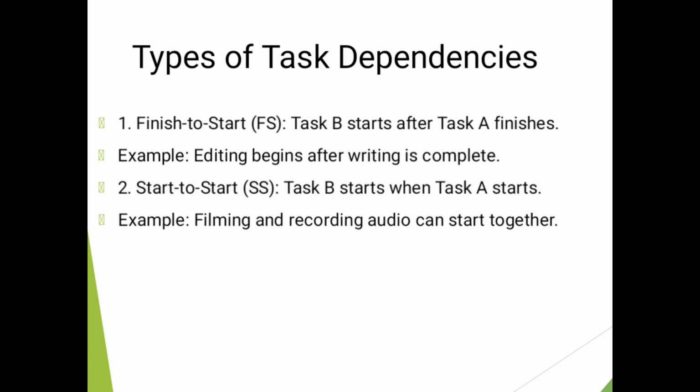Then number two, we have start to start. These are tasks which start at the same time, concurrently. For example, task B starts when task A starts. For example, when you are filming and recording audio, these things are supposed to go together. When you are teaching online as I'm doing, you need to understand that filming as well as audio recording are supposed to go together at the same time.